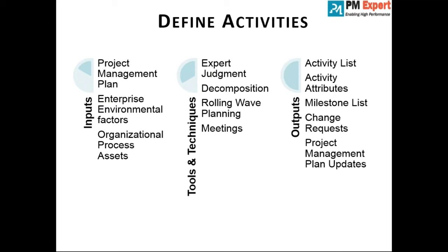Got it. Chiquita, are you clear or not? I think we talked about that before: the higher the risk, the shorter the phase. Yes, higher the risk means you need to review frequently. That's why the higher the risk and the higher the complexity, the shorter the stage should be. At the end of every phase, you should do review and retrospection to see what went well, what went wrong, and what can be improved going forward.